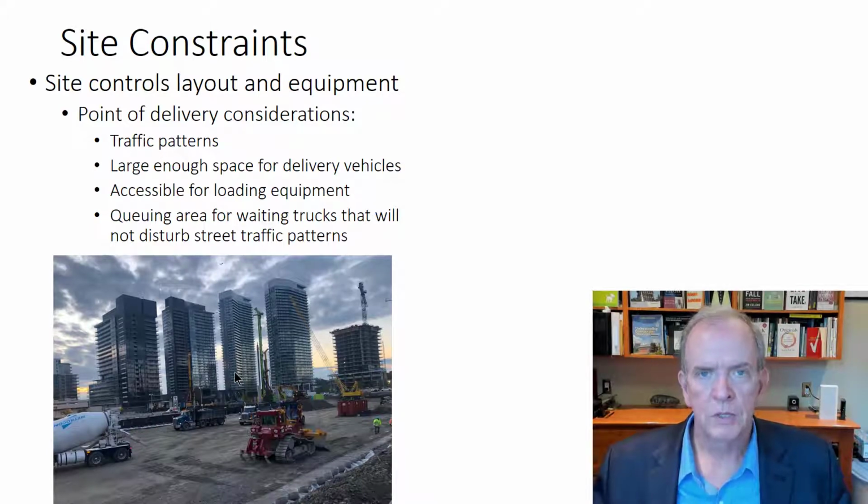We started the course by talking a little bit about processes and systems, and you definitely want to have some processes and systems so that things don't just get out of hand. If a trade is going to make an order, they have to coordinate it through you, so that it's going to be delivered at such and such a time, and you can make sure that they have time in the queue to get to where they need to go, like a loading dock.